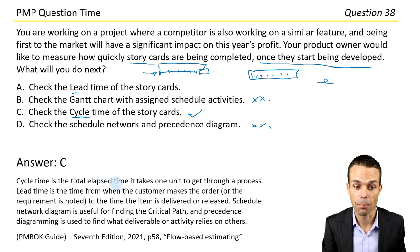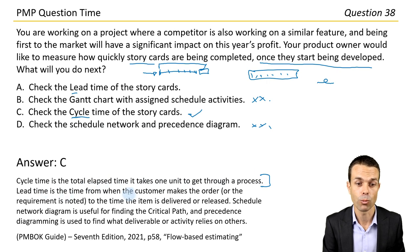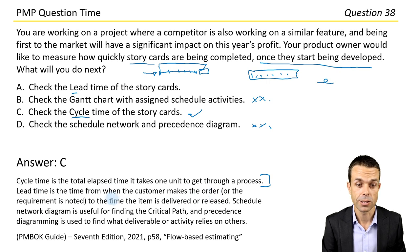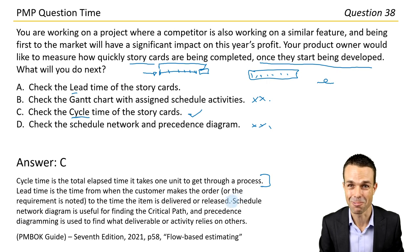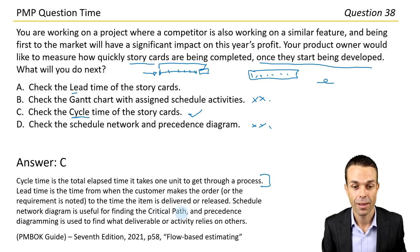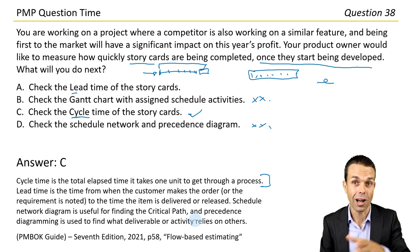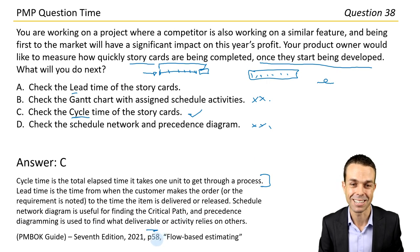Our answer is C — cycle time. Cycle time is the total elapsed time it takes one unit to get through a process. Lead time is the time from when the customer makes the order or the requirement is noted to the time that the item is delivered or released. Schedule network diagram is useful for finding the critical path, and precedence diagramming is used to find what deliverable or activity relies on other activities. Page 58 under flow-based estimating in the PMBOK Guide 7th edition.